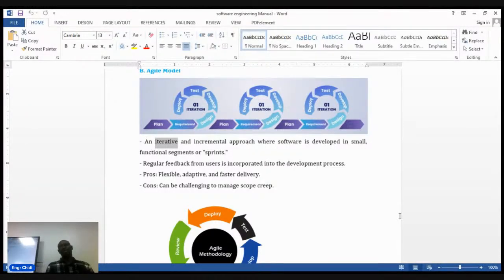But if you are not using Agile method, you may think that because it's a high institution, result is the most important, and you'll be doing result. And this thing can take you 6 months. And by then, the headache of the hostel has given them fever, and they are bored with it. But if you do the one that is pressing them, they are happy with you. So Agile will help you do that component by component until you build the whole software and put it together.